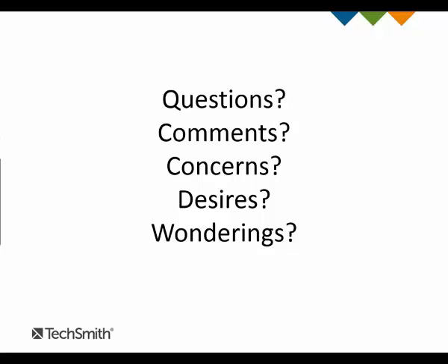So, are there any other questions? Got a long time. Steve? So how do you do this, like all these boards are linked? Who cleans up their published column? Does the order matter, and archive stuff? Well, we actually have another script that I didn't talk about that goes through every night and archives slices or cards that are two weeks old. If they're completed? Yes, only in the published column. We're not just randomly archiving stuff off the board. We're smarter than that. Come on, Steve.